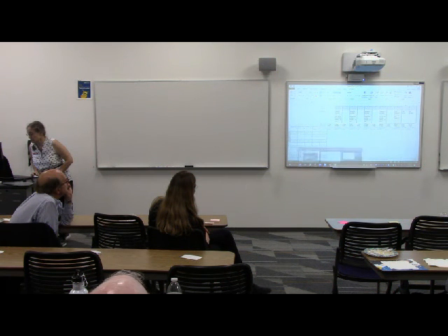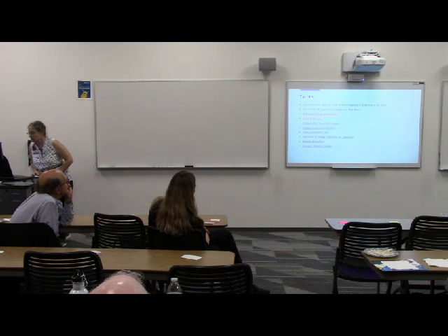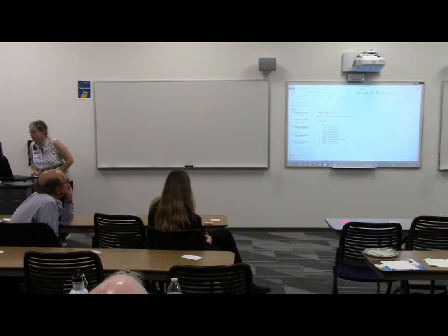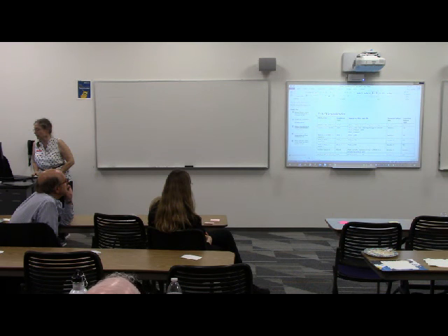So, back here. We had the people listing their dependencies. Here, the JIRA if you had it, the team that was depended on, the other team's JIRA, and when you would like to have it by. And then they discussed it with the team.